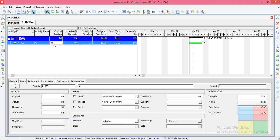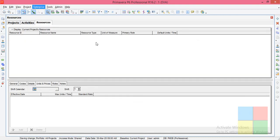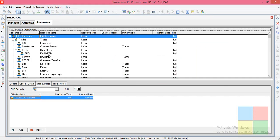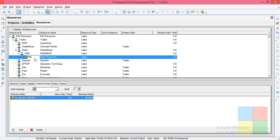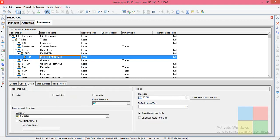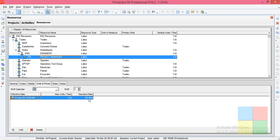Let us change its duration to 10 days. Now let us go to Enterprise Resource. I will add a new resource named 'PM' for Project Manager. Let us assign the same calendar as that of the project — it is the same here, 5-Day 8-Hour. I used 5-Day 8-Hour for the project, so for the resource I'm going with the same calendar.